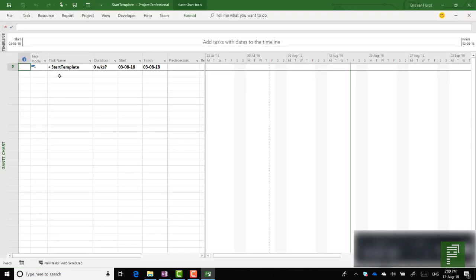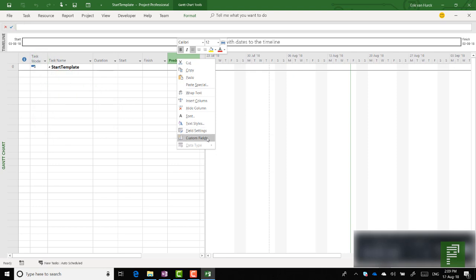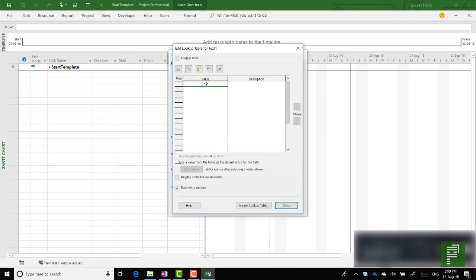So what would you do with a start template? You are not going to enter tasks in there, not dependencies, no summary tasks, none of that. What you do here is you create your boundaries like views, like custom fields and all that stuff. So let's create a custom field. We're going to go to custom fields and the first custom field I want to create is a lookup table where I'm going to place the locations — Amsterdam, Copenhagen, and Aarhus.